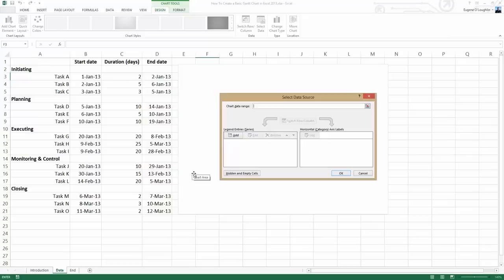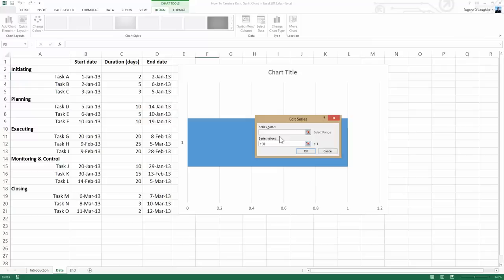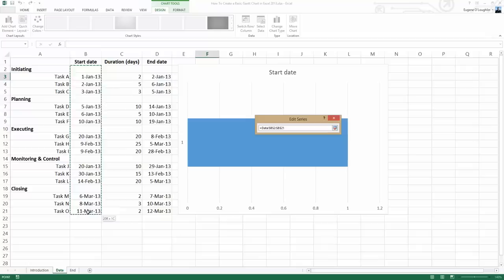In the Select Data Source window, there are two important boxes. First, we need to add in by clicking the Add button on the left box. This gives us an Edit Series option, and this is where we want to add the start date. Type in Start Date as a title. In the Series Values, click on the Select tool and select with my mouse in column B all the values underneath the Start Date heading, in my example from cell B2 down to cell B21. Make sure you're capturing the blank cells, or else your chart will be out of line. In the Edit Series window, click on the Select tool again and click OK.